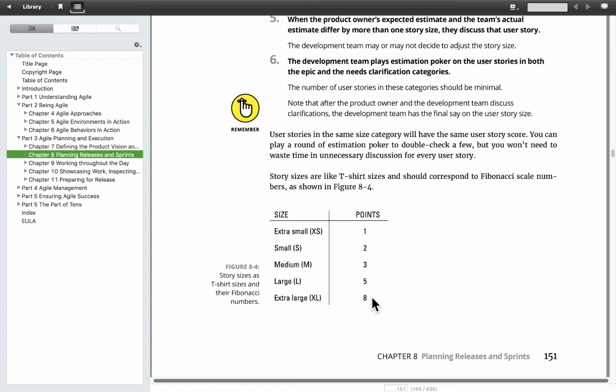Well, they are your team's subjective feelings about how much work is in each of these things. Can you compare these point estimates from team to team? No, you can't. We think it's enough that we try to get them reliable within our own team.